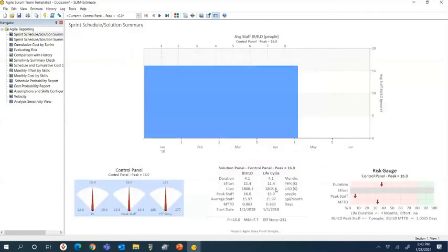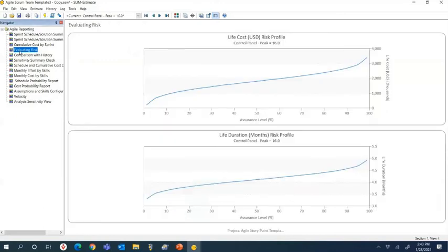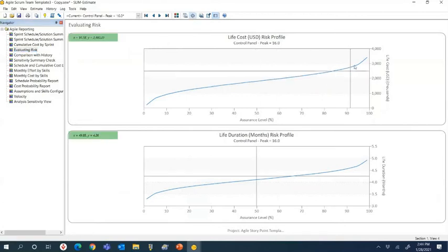And you can see here, again, adding a few people, we'll deliver in 8.5 sprints instead of 10. Saves a few weeks, not much, and bigger cost. And we've got all these nice analytics here as well, where we can look at the risk, and we can decide how much risk we want to carry here. You can see here that we've got a great chance for budgeting, great chance of staying within $4 million.